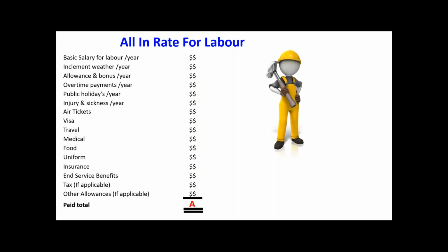Okay, how much is the accommodation in general? It's like a bed space cost, right? Labor accommodation, how much per bed space? That price maybe you can put. Or if you have your own accommodation like a porta cabin or already built, then you can use your own cost. Anyway, you have to allocate some cost for a car, each and everything. So this is how we derived the all-in rate for labor.